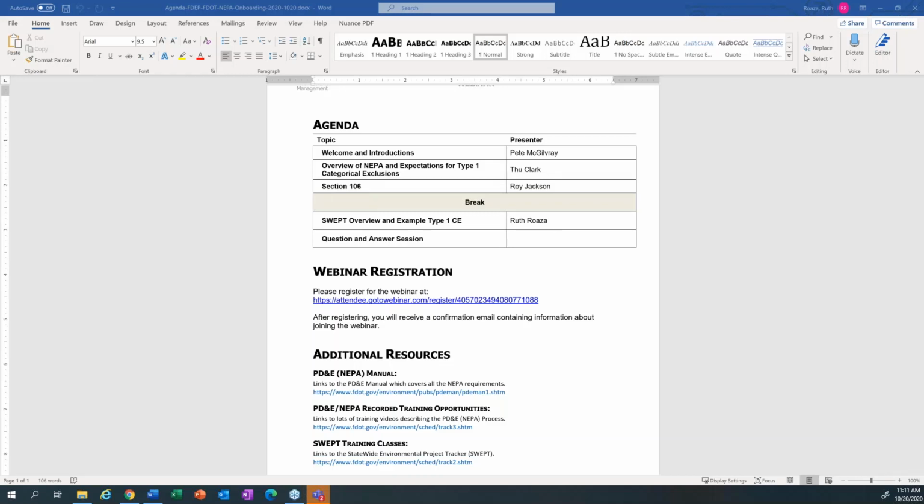So actually, once the priority list has been approved by Federal Highway, all of the projects that were approved for funding will need to submit their NEPA documentation, and then depending on the outcome of that eligibility, we'll execute a grant agreement, and then once the grant agreements are executed, the grantees will have 180 days to submit their Task 1 documentation.